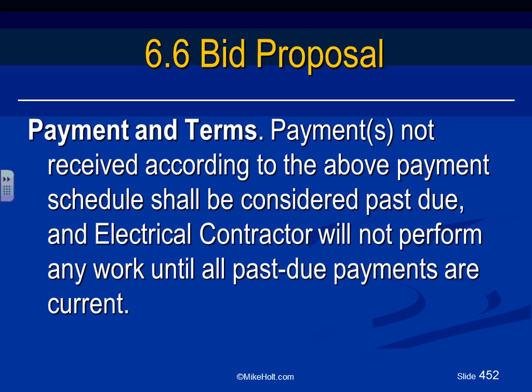Okay, payment and terms. This will list how you want to be paid, gentlemen, for the amount of dollars. How are you going to be paid? And if there's a past due payment, the contractor will stop working until you pay me on time. So you have a schedule of payment. That will affect the cash flow for your company, guys. So you need to make sure that you're paid on time based on a scheduled payment agreement. And if they don't pay on time, you have the right to stop working on their project, basically halt the project.